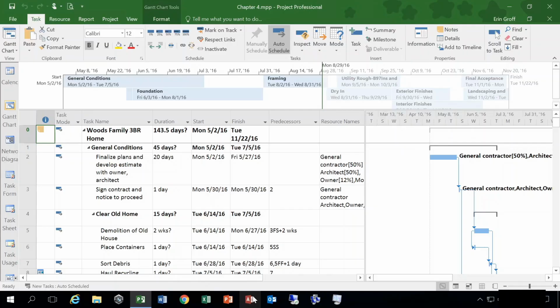For example, a printing press can only run one job at a time, so you may need to schedule based on its availability. Or you may need to rent equipment, such as a moving truck, to perform a task, and you need to schedule most efficiently to minimize cost. Space can also be treated as a work resource if you need to schedule around its availability or track its cost by time. Examples include conference rooms, storage, convention centers, and so on.